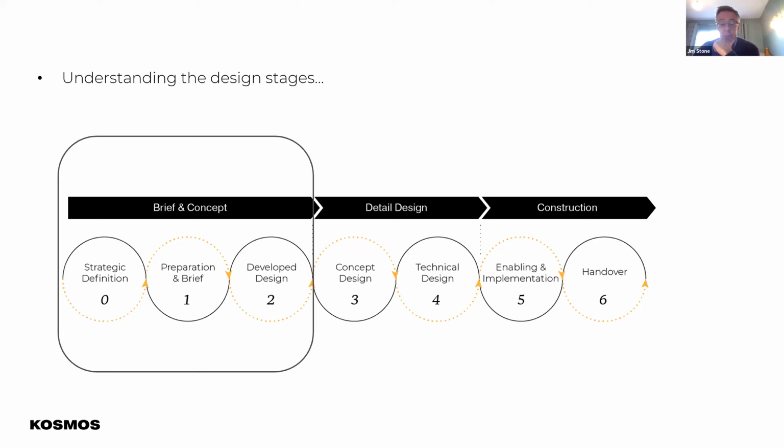And I would just reiterate what you mentioned previously on a number of occasions, Ross. The key to this, what I'm picking up, is collaboration. Yeah, it doesn't work otherwise. Another interesting one would be cables in electrical. When do we expect the cables to be designed? In some instances, they'll never model cables because of the amount of work involved in modeling the cable. You'll find the cable on the diagram, no problem at all, for main distribution, and maybe the engineers will design the bus bars for really high voltage cable, etc.